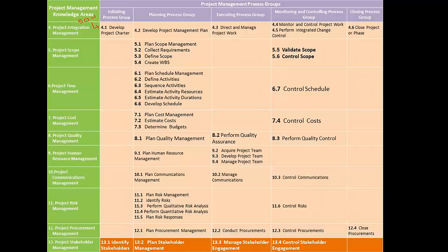The very first document in the project management lifecycle is a project charter. That's the objective of the process number 4.1, which is the first process in project management lifecycle. The project charter is created by the sponsor for in-house projects and by the customer if it's a vendor-supplier related project. The charter recognizes the existence of the project and declares the project as open. It also recognizes the existence of the project manager who can now spend the organizational resources on the project.